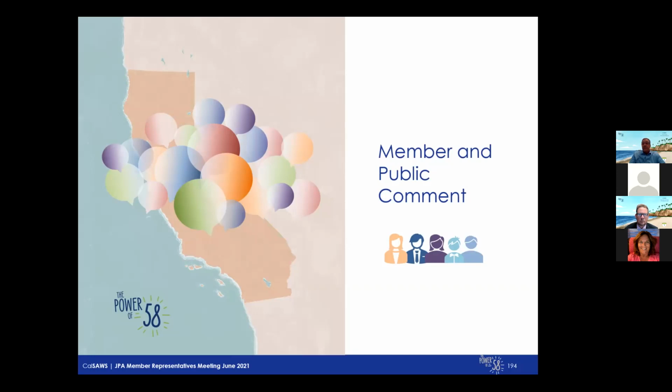Michael, when there was a slowdown, there were some defective devices that we received, and it started to look like it could impact the schedule. That was the catalyst for us to put in that image that John and the implementation team talked about, so that we're tracking to that. We're also having status meetings every single day to look at that progress. We are proceeding positively, but there were some scripts and processes that needed to be modified and adjusted and are being tested. We wanted to be really transparent that it's a little different than we imagined.